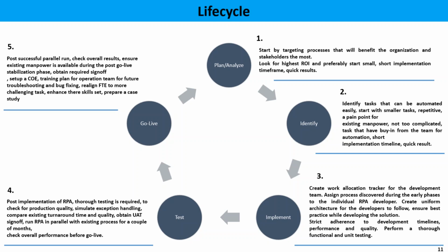And the operation will be running the full volume to get that much confidence. Yes, the team has developed a good thing. It is implemented everywhere, and we are getting the desired output that we basically get as an agent when we work as an agent. That will come at the UAT stage. The next phase, after getting the sign-off for UAT, is the go live stage.